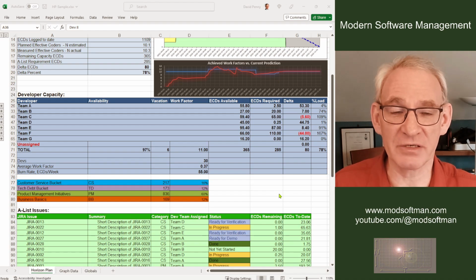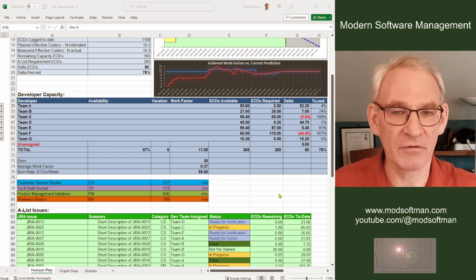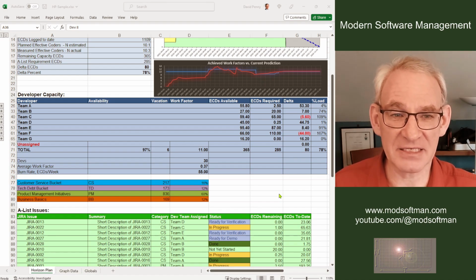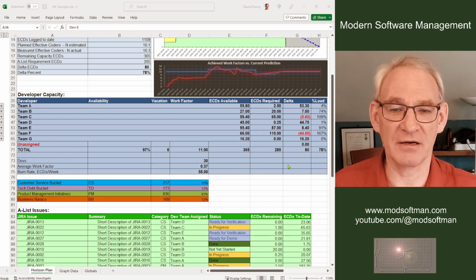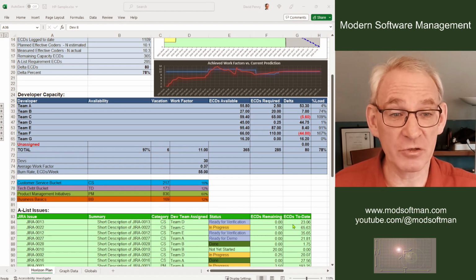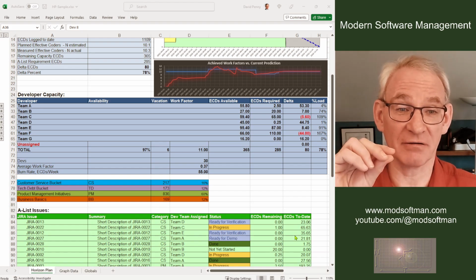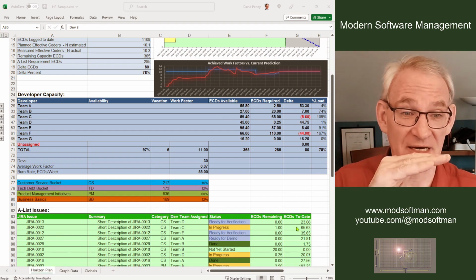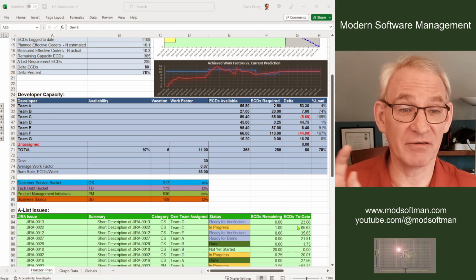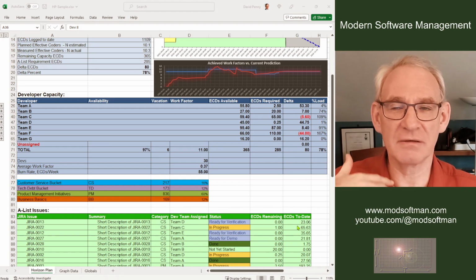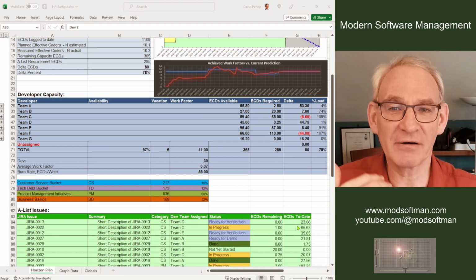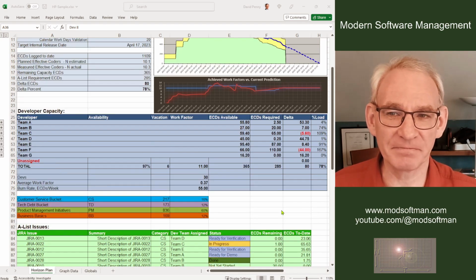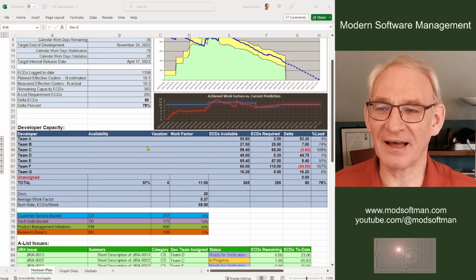So it's not too onerous, and it really assists them from a software engineering point of view in being able to get their estimates better, both for their work factors and for their feature estimates. And we have postmortems that we conduct on the features, where we can see the time series of what was the estimate, how does the estimate change over time as work gets done, and you bring the team together and go over those postmortems, and just the mere fact of going over those makes you better and better at estimating things. The plan is also very live.